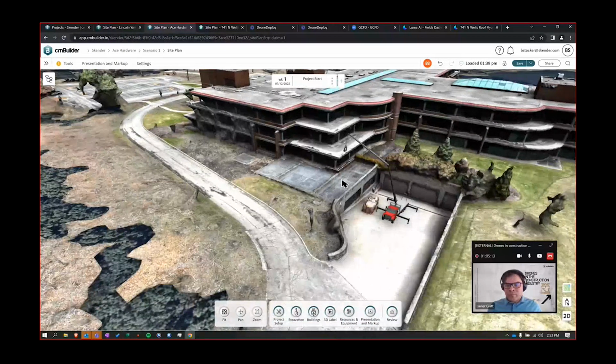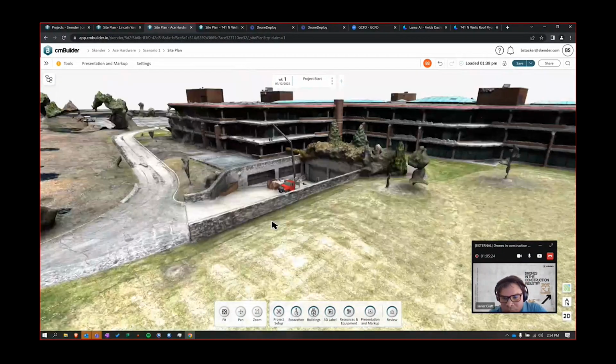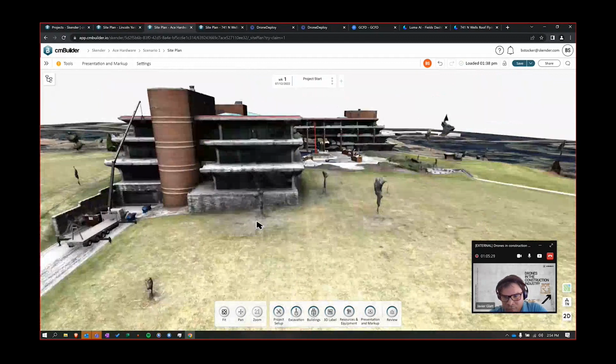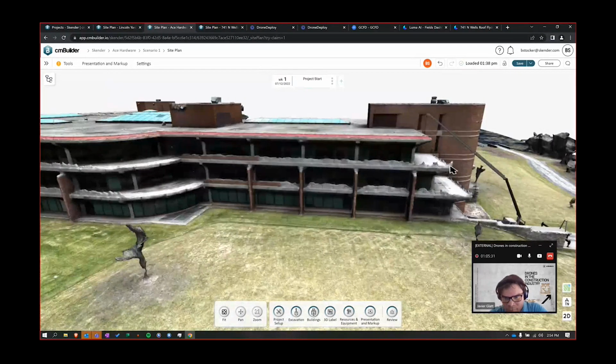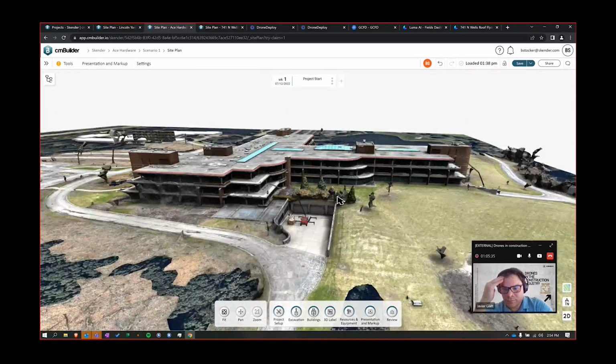The main thing I was trying to figure out here was what type of drywall truck we needed that would be able to reach certain levels of this building, because you had weird conditions of these steep inclines at these loading docks. And the building itself is tiered like this. It would have been harder to calculate on paper what size truck you needed and what size arm and everything.